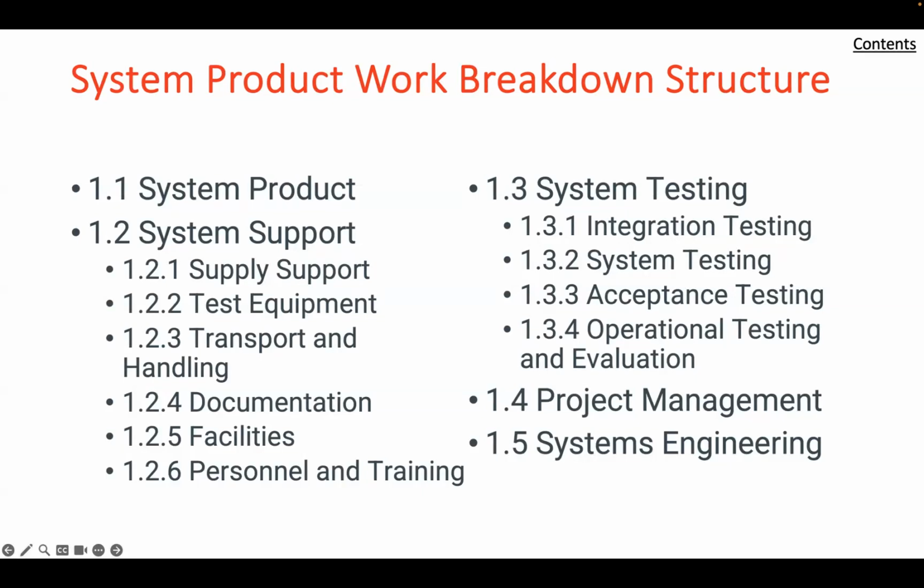Each of the system support categories applies to both the development process and system operation, which may involve quite different activities. Moving on to 1.3 system test, it begins after design of the individual components have been validated via component testing. A very significant fraction of the total test effort is usually allocated to system level testing, which involves 4 categories of test as follows.